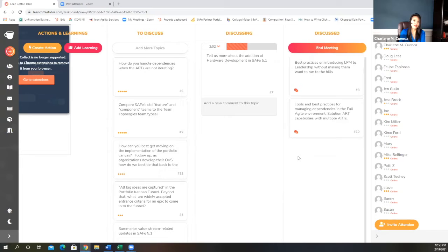Right, and even though we're dealing with hardware components, and like Kathy mentioned, some of those things could have long lead time because sometimes we've got to procure the particular piece of hardware, especially if we're working with suppliers. There might be a lead time through the contracting process to even get it to your organization, and then once we have that, we need to provision it to be used on our internal systems and networks, and that could have some lead time. But the principles and values of SAFe are still there. They're still the same. They're still applicable in the hardware space.